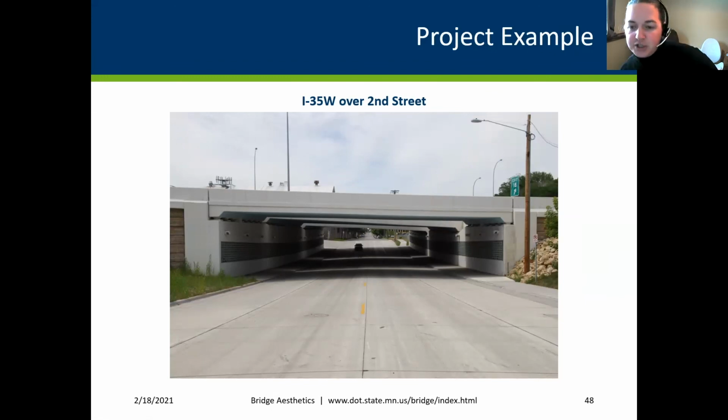But what Flint Hills Construction did was they had school children come in and build these tiles. And what that did for our structure, so obviously that's not easy. That takes a lot of project coordination. You have to coordinate with schools. You have to generate interest. They had to get the school children there, safely have them manufacture these tiles, store them, wait for them to dry, all of those things. So it's not easy.